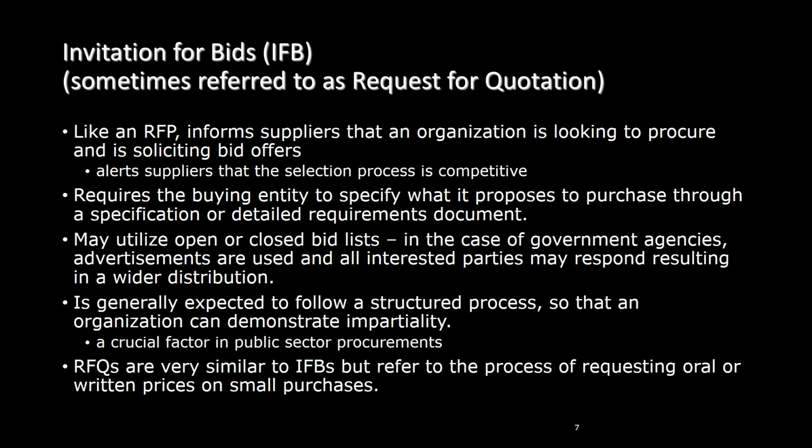Like an RFP, an invitation for bid or IFB informs suppliers that an organization is looking to procure and is soliciting bid offers. This alerts suppliers that the selection process is underway and a competitive approach is being used. An IFB requires the buying entity to define or specify what it proposes to purchase through a specification or detailed requirements document. IFBs may utilize open or closed bid lists. When an open bid list is used, it means that any and all interested parties may participate and submit a bid response.